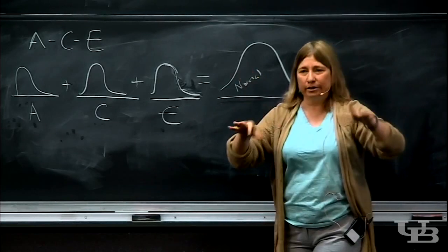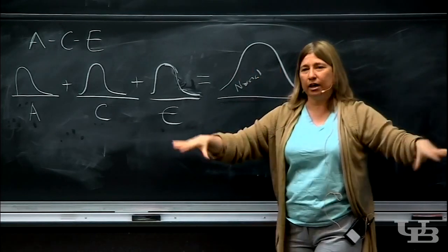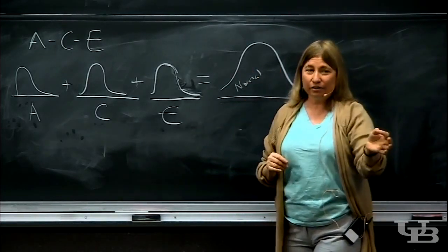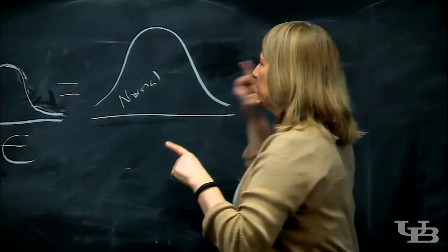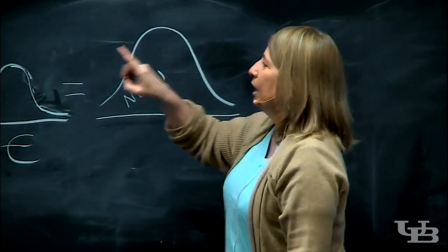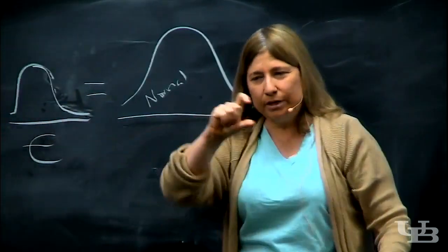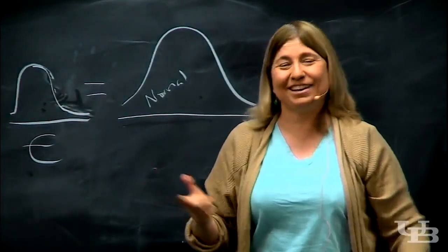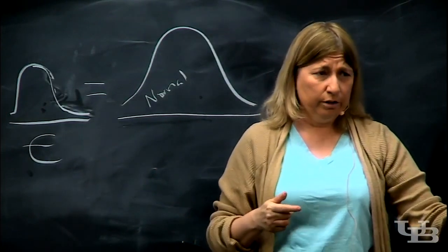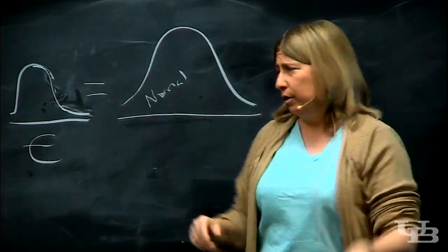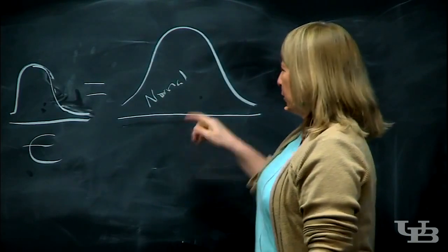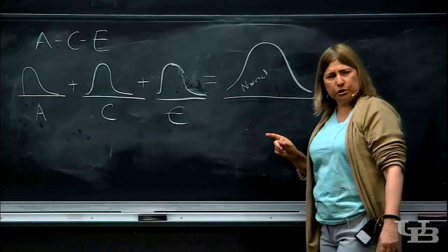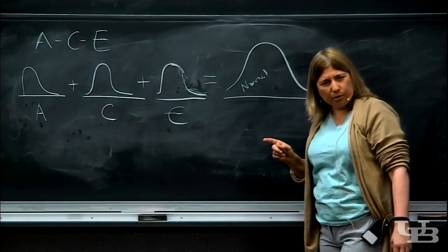All their noise will basically start to add up to a normal distribution, and that's our justification for gauging the risk in each one of these paths by using a normal distribution and not going back to that little beta distribution that we started with that gave us those formulas that we need for PERT analysis. You say, well, yeah, okay, fine. But I don't get, for the 3 normal distributions, where did you get the numbers?